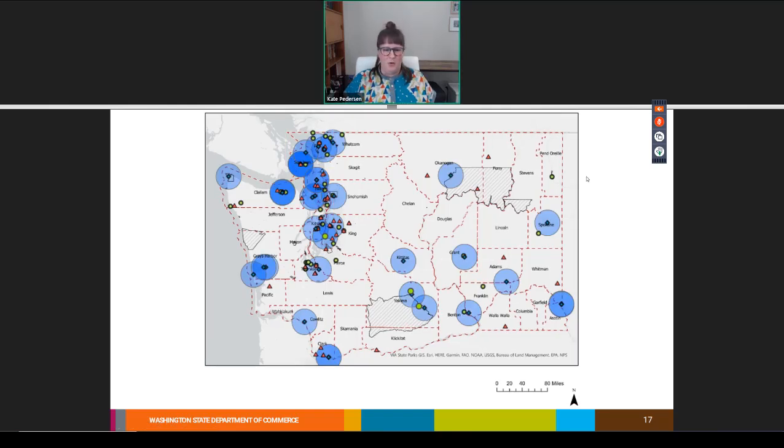Thank you. In order to spread projects across the state, we rank communities higher when they're not within 20 miles of another project, either another technical assistance project or a project funded through a previous competitive grant. There is more that goes into this, but in consideration of time, I'm not going to go into all of the details about how we look at islands and proximity to projects at different points in the process. But I'm happy to discuss this with anybody who is interested, and my contact will be available on the last slide. Next slide.